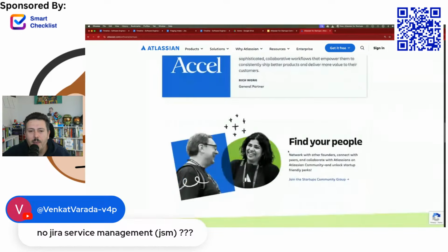Now, inside of Jira, once you do plan your sprint, right? And so once you essentially take work from your backlog and you move it into your sprint, you're going to do a couple of things. You're going to estimate the work, right? So you're going to say, okay, how many story points is this particular item worth? What's the level of effort, right? We should all know what story points are at this point. And then optionally, although I like to make this a requirement, I like to assign the stories to an individual to build accountability.